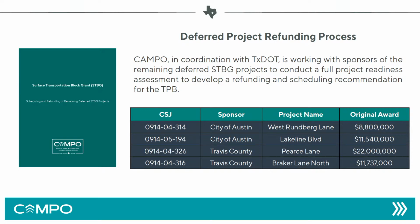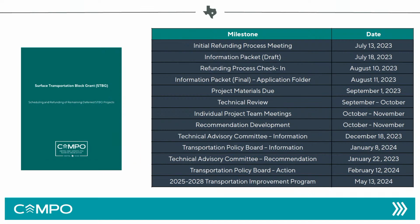So right now, I'll go through the schedule briefly. I'm not going to go through this whole thing, but we kicked this off in the middle of the summer. The sponsors submitted materials by September 1st of this year, and right now we're going through a technical review of all the materials they've submitted. Those materials are related to project readiness, and NEPA is one of those activities. When they were deferred, all these projects were deferred with construction funding, so we're working on the assumption that the sponsors are moving forward in the project development milestones, including right-of-way purchasing, NEPA clearance, preliminary engineering, and things like that. They've submitted these materials, and we're reviewing those to see when we can potentially schedule those projects in the future.